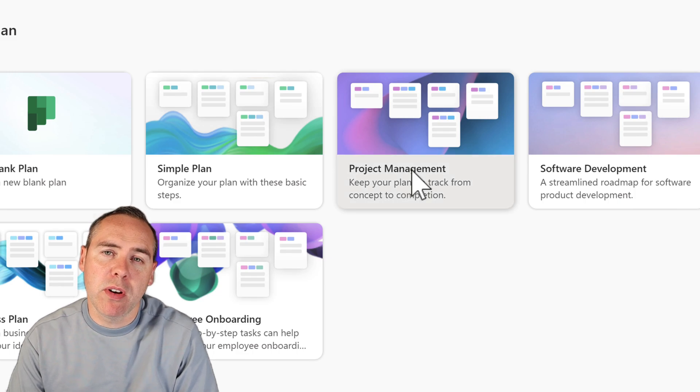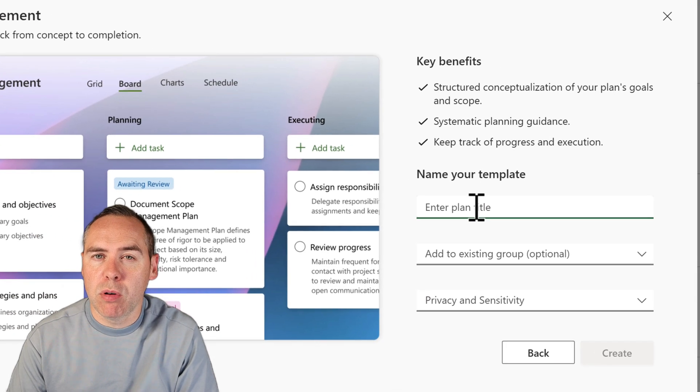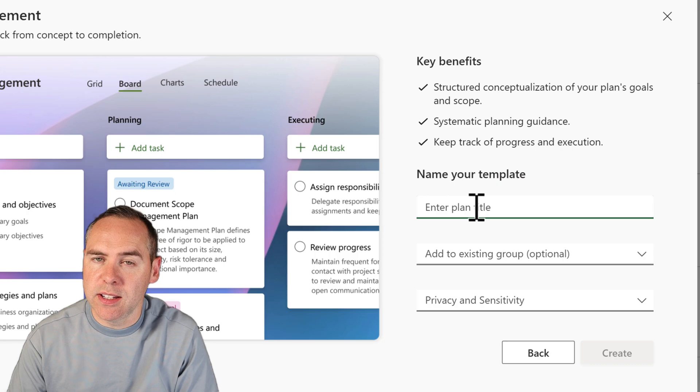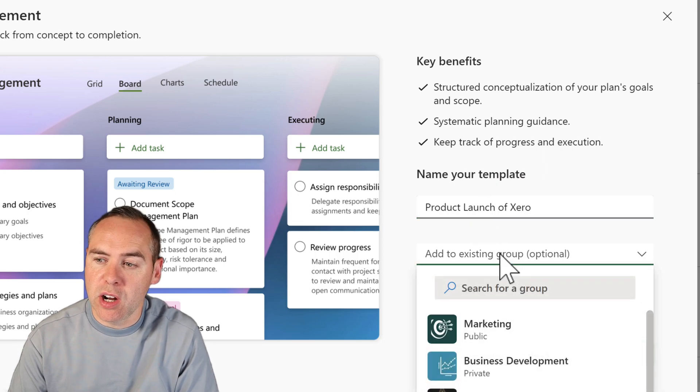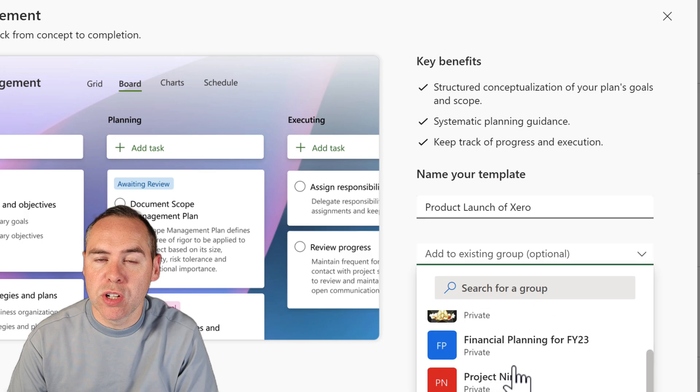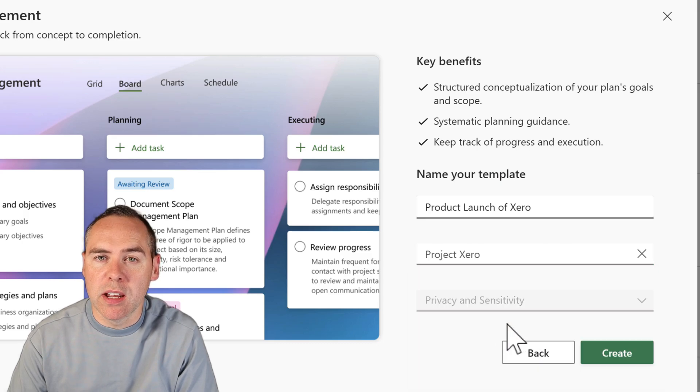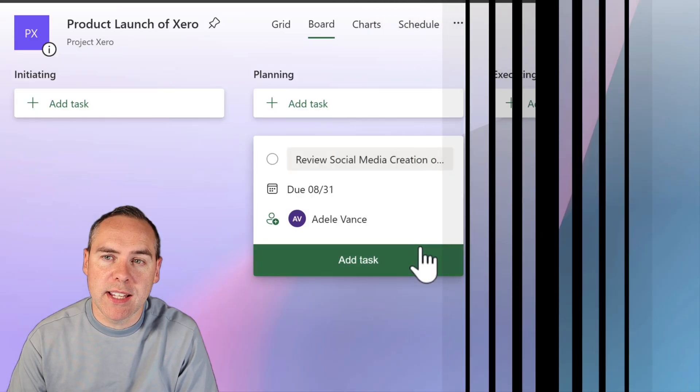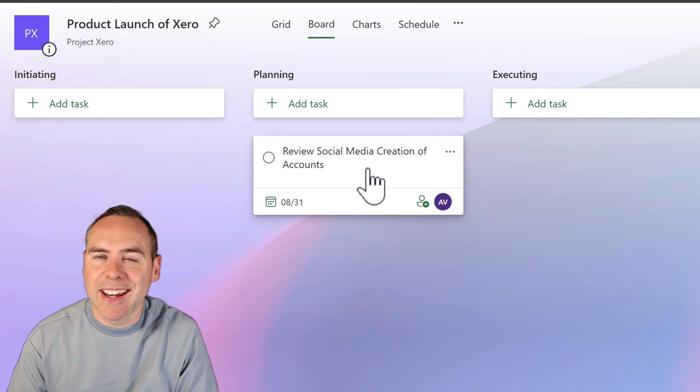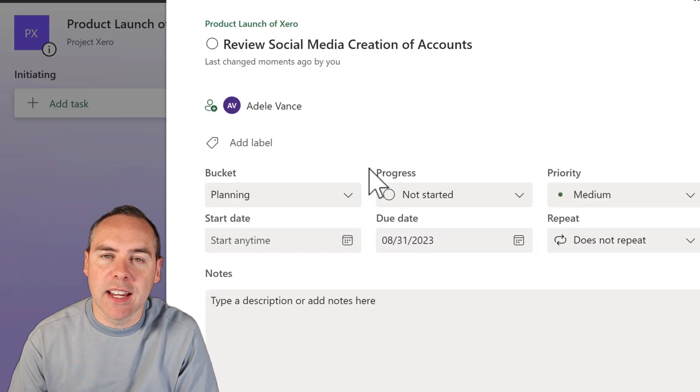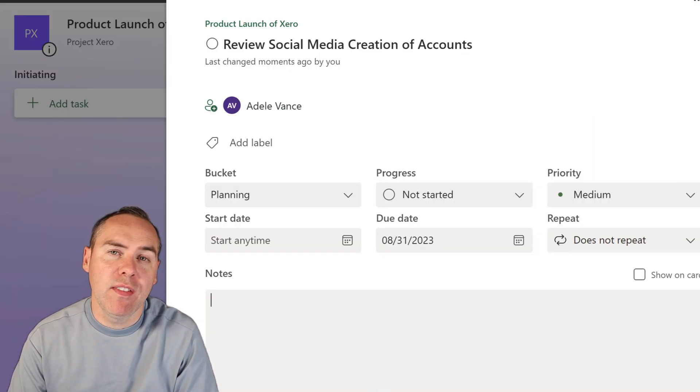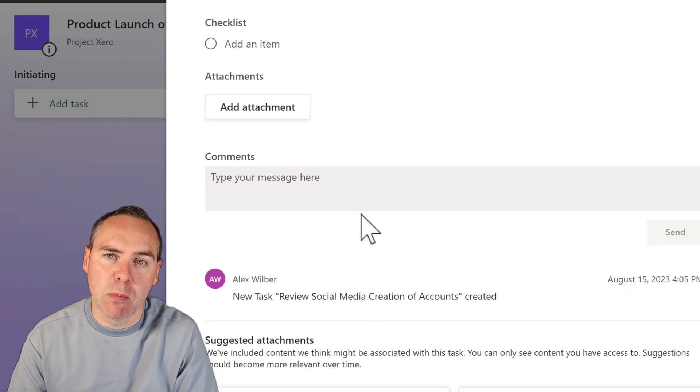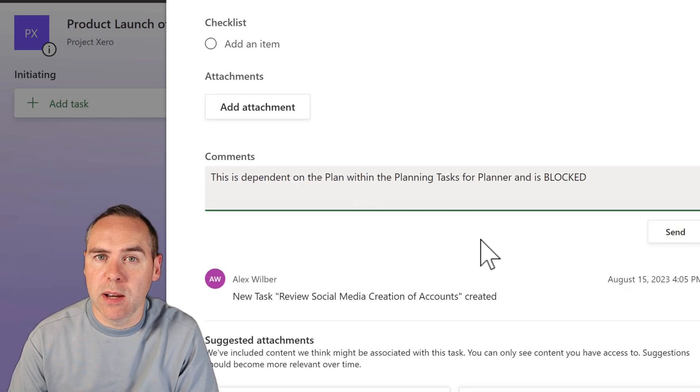If I create myself a new plan for a project that's also associated to the one I created in our plan, such as in the scenario here where we create a product launch in the same team we work in, we can create a brand new task in that plan. But we once again cannot define a dependency against another Planner even if it's in the same team or group. That is not supported in Microsoft Planner.